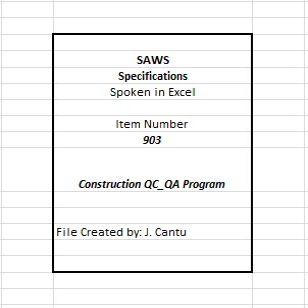The contractor shall submit the project-specific QC/QA plan and receive approval of the plan by SAWS prior to the beginning of the construction phase of the project. The contents and obligations of both the contractor and SAWS relative to the quality control and quality assurance program are further addressed below.